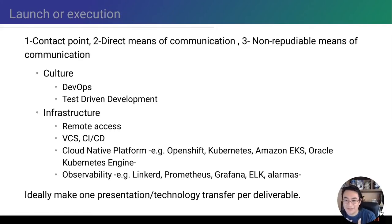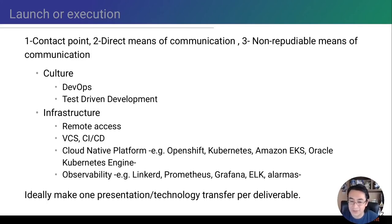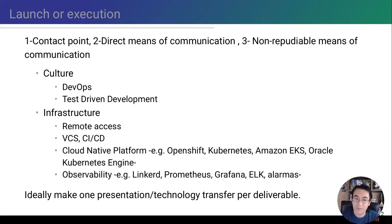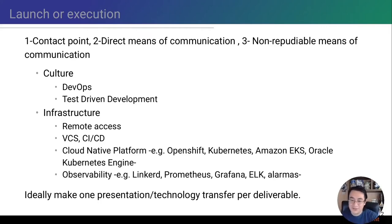After the definition phase and being hired as contractor, I have to launch the second phase of my project and execute each of these spaces, in which I have a direct contact point of communication — in my case WhatsApp or Telegram, depending on company policies. But also a non-reputable mean of communication, because when you are interacting with different software development teams, you have to be accountable for the things you did right, but also for the things that went wrong. Having a non-reputable mean of communication gives you a risk management area in which you and the development team have an audit log — you can see which decisions were made, and most importantly, at which time those decisions impacted the system.